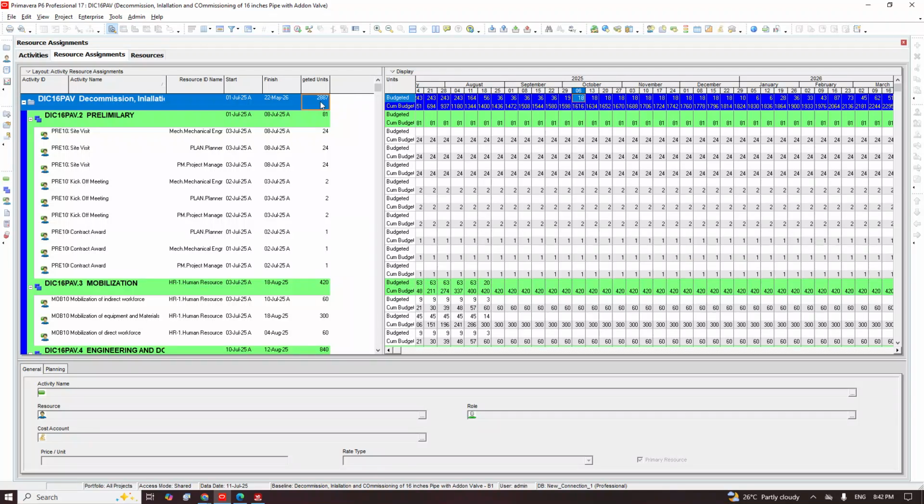So now what am I trying to do? So basically what I'm doing here is to tell you that look, the projected labor unit remains the same, and this is what is being distributed. If you watch here, these values you are seeing here is the same projected labor unit. And this projected labor unit is the effort that the workers are going to put in place each time they are working. So it helps us to know how many persons on site. It helps us to know the weight, the effort, the weight they'll be putting in terms of percent. If this number of persons are working, what is the percentage they are going to contribute?